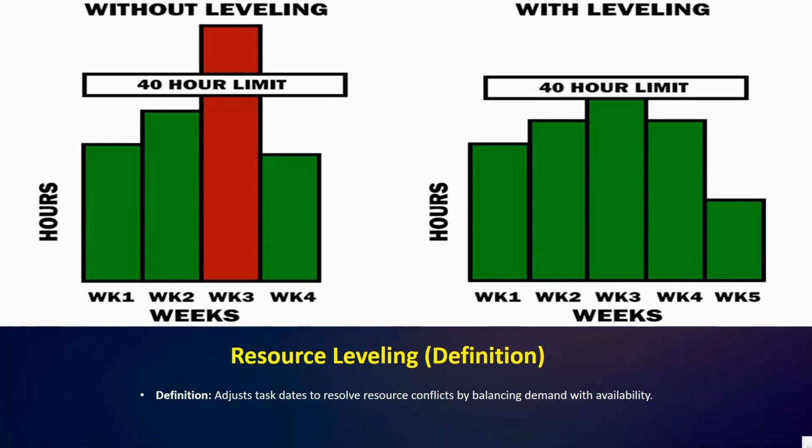The purpose is to match resource demand with resource availability. But keep in mind, this may change the overall project duration or even affect the critical path. Here in the picture you can see an example with leveling and without leveling.